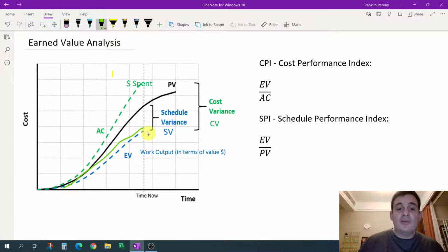that we're behind schedule. We have a schedule variance here, right? We haven't gotten as much work done as we thought, but our cost variance isn't so bad. We're pretty close to on track. It means we're behind schedule, but we're not really necessarily over budget, or we're just a little bit over budget the way I've drawn it. It's pretty close. Does that make sense?